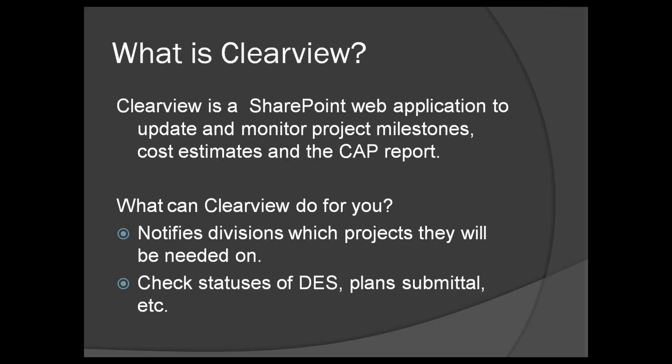So you might be thinking, how exactly does this help me? What am I going to get out of this? Does your project need traffic signing? Just by setting the traffic signing milestone to required can let the Division of Traffic know that signing is needed. It is a way of getting this project in their work queue. This is a quick and easy way of notifying traffic that signing is needed on this project. The subject matter experts, such as traffic, can input into the system when they have completed it to alert you of this as well.